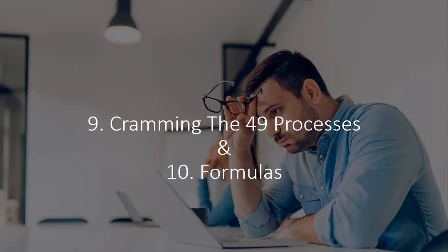If your SPI or CPI is less than 1, that is poor performance or undesirable performance. That is not ideal. If you have a 0.9 or even a 0.95 or 0.99, it's not the best. It's not horrible, but it's not the best. If you have a 1, that's perfect. If you have a 1.2, a 1.1, that is better performance in any of those areas of schedule and cost.